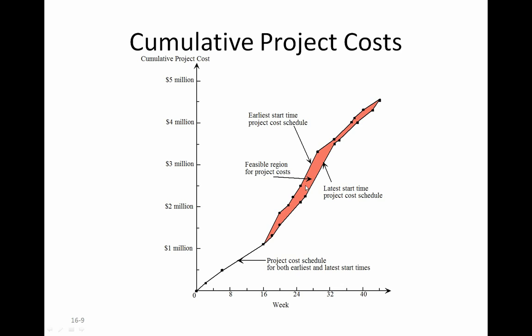Then as I said before, the risk that you run in saving some interest payment over here is that you are basically flirting with danger. That is, if you start late and something goes wrong, the project can go tardy, and in that case penalty payment would kick in.